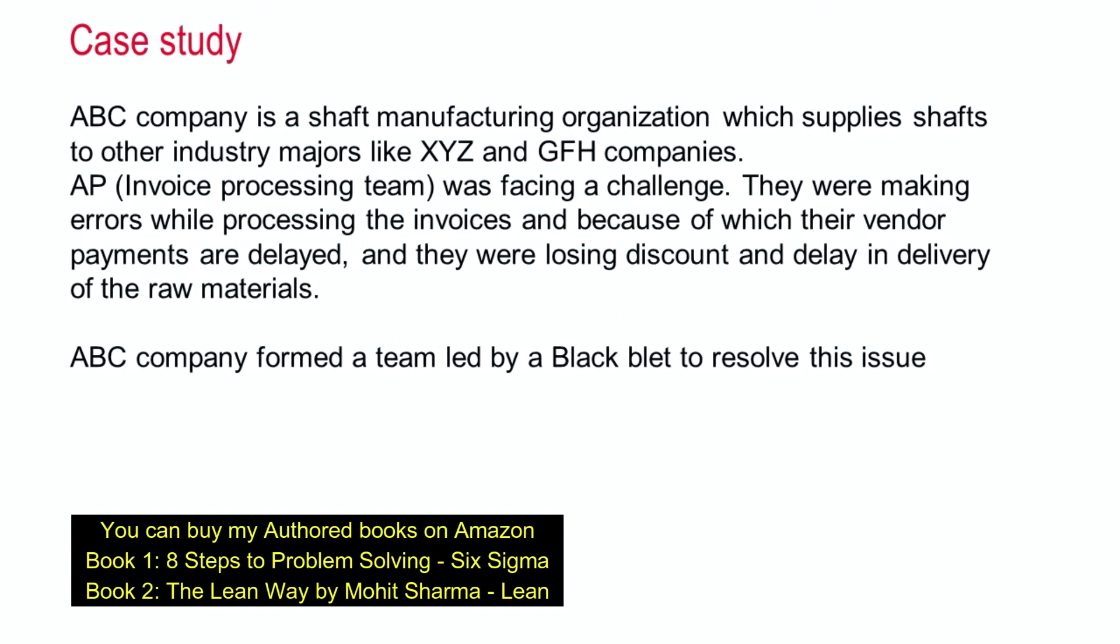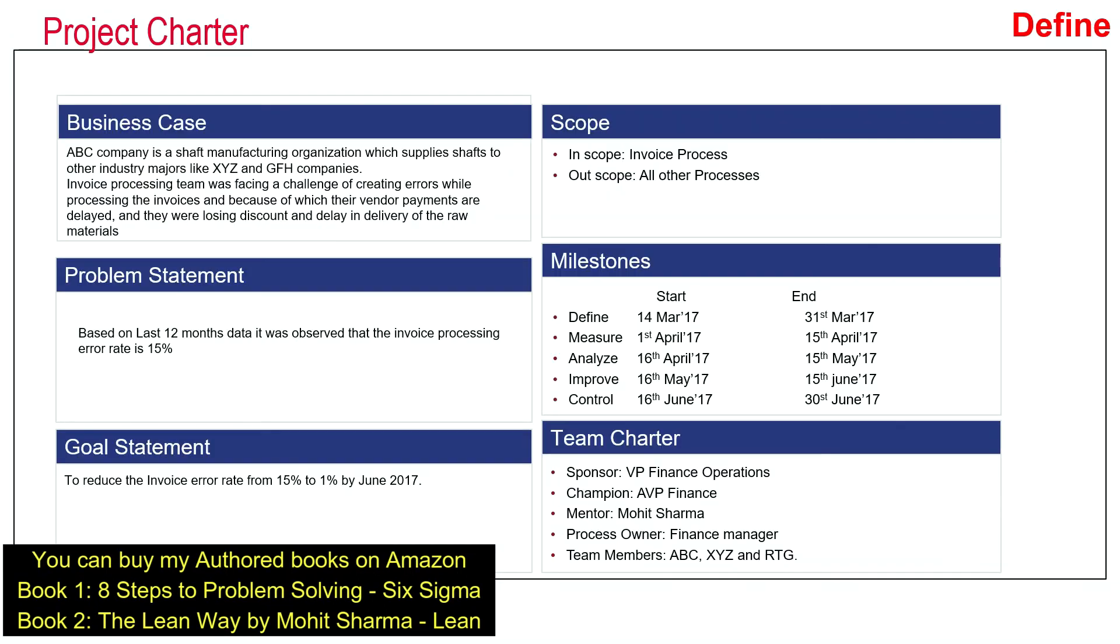The first thing the team did was to create a project charter. A project charter has six elements: business case, problem statement, goal statement, scope of the project, milestones, and team charter. It is very important to identify these six things before you start a project. The business case should have the background of the business, describe what is the problem, and what will happen if this problem is not resolved.